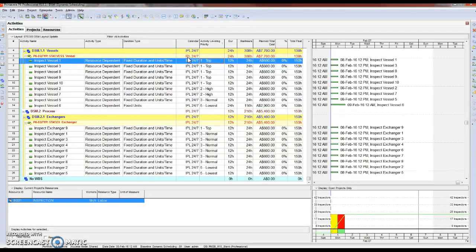Rather, we want to focus on longest path and critical jobs, and we want to focus on earned value, not on baseline compliance. So yes, we'll measure SPI, Schedule Performance Index. We'll measure CPI, Cost Performance Index. But our primary focus is on measuring earned value on a daily basis or shift by shift basis.